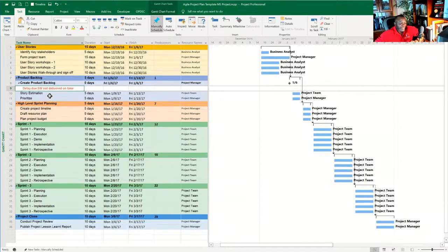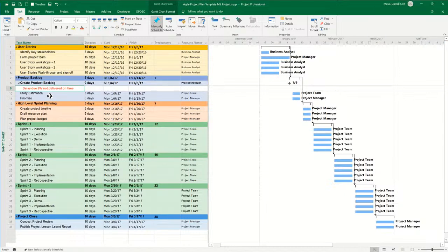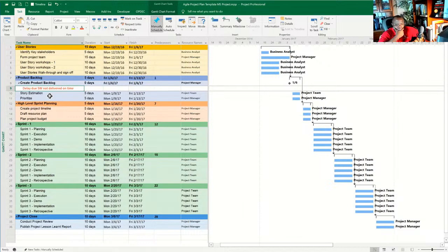Okay. And the assumption is a 24-hour calendar because you're working around the clock. So are people swapping out, or are people just working flat out 8-hour shifts or 12-hour shifts, and then being replaced by generic resources that mimic what the previous person was doing? Let's just call them installers. There'll be a set of 3 installers from 7 AM to 7 PM. Then there'll be another set replacing them at 7 PM to work to 7 AM. And that'll go on for 7 days a week, pretty much.